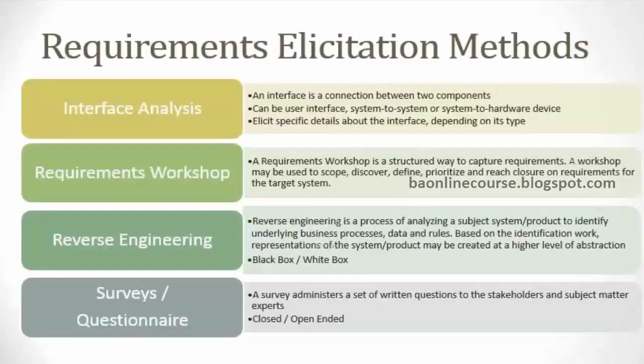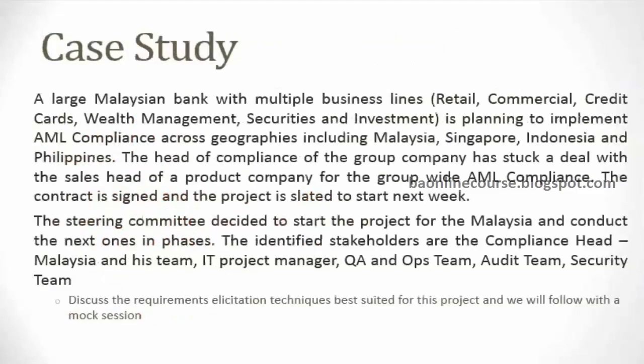Okay. So broadly, are you clear about how to approach requirements? I know there would be a lot of unknowns and uncertainties, but if you're able to ask those right questions, you'll be able to understand this. And that clarity will not emerge in an hour or half an hour. Typically you would spend a month or so on the requirements. For a system like this, there would be one month assigned for capturing the requirements. So you'll not get that complete view on day one, right? You will not understand all the requirements on day one or in the first hour of the day, right?